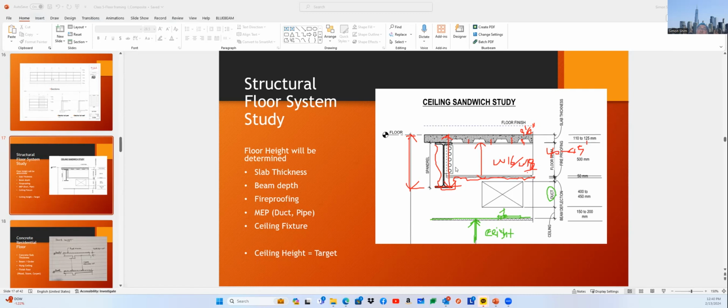So this is, I think, typically the architect, structural engineer, and MEP engineers, the main three parties, working closely together during the design phase. But especially in a high-rise building, the higher priorities are architect and structural. So typically, when a project is kicked off, the architect usually contacts the structural engineer first and discusses their project requirements. Later on, they could hire the mechanical, electrical, and plumbing engineers.